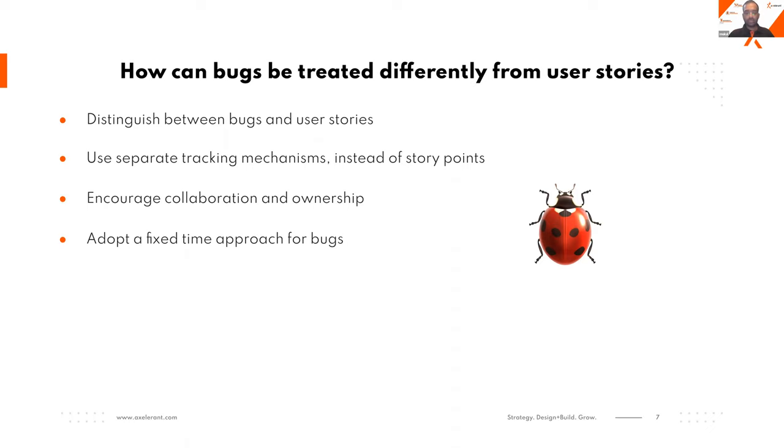Sometimes you can fix the bug by just adjusting some code lines. And sometimes it is so hard to investigate where the problem actually is. Sometimes it is just a content issue. So if you have to actually estimate the bug, it is equivalent to solving it. So best is to prioritize your bugs, sequence your bugs: top priority bug, second priority, third priority, fourth priority. You can sequence all your bugs and fix a timeline for it. Like we will give 2 days in each sprint, or we will give 1 day to fix the topmost bugs.